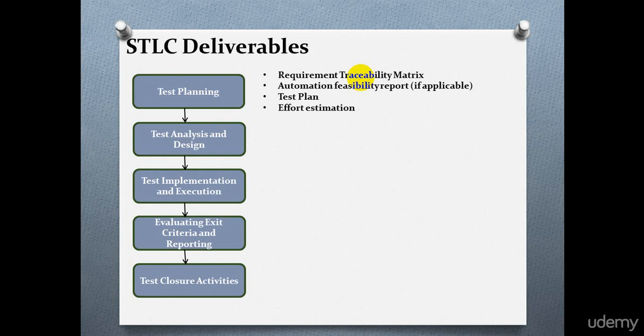And also we have one more deliverable as part of test planning, which is effort estimation. Effort estimation is also delivered in this phase. Test estimates can be affected by many factors like timing pressures, people factors, and geographic distribution of the test team and so on.